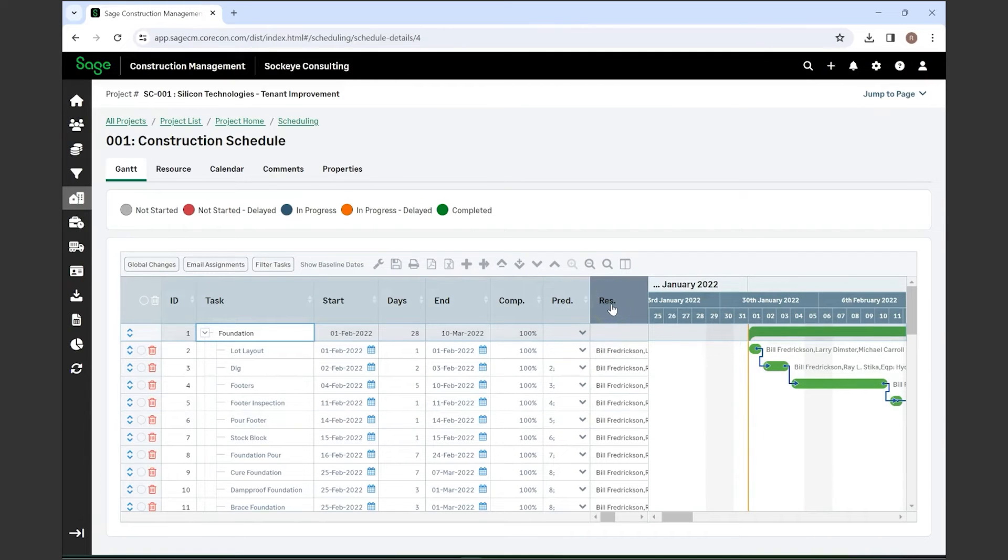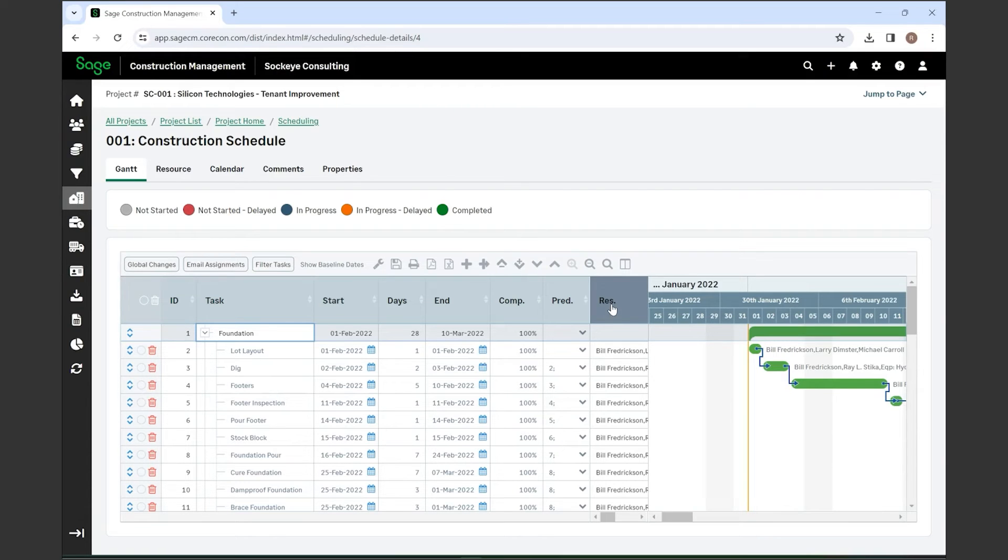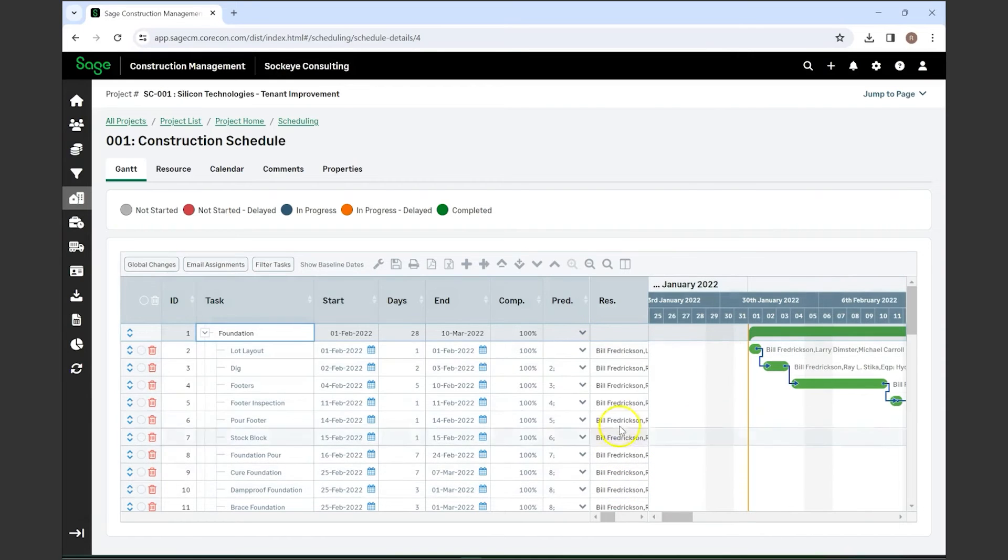Beyond that, you can also add resources whether it is the PM related to that so that they're on each of the items, or if you have a vendor or subcontractor that has to do with each item you can also put them in as resources. Anyone who's a resource on this will then be alerted to changes made in regards to the schedule.